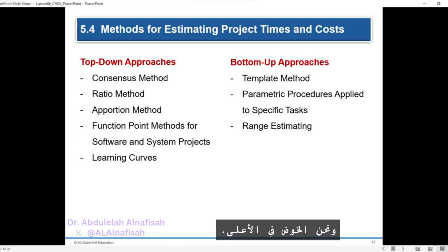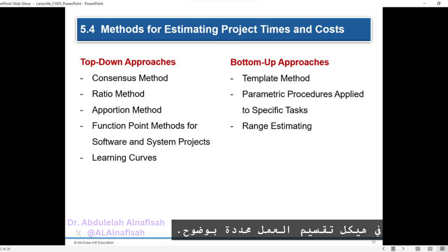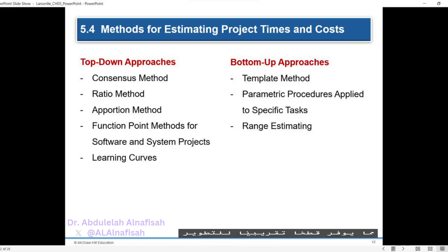In this discussion, we delve into top-down estimating methods at the strategic level of project management. In situations where detailed information is lacking, like in the initial project phase or when the design is not finalized, top-down estimates come into play until tasks in the work breakdown structure, WBS, are clearly defined. The consensus method involves pooling the experience of senior and or middle managers, often utilizing the Delphi method for greater rigor. However, these top-down estimates are preliminary and occur in the conceptual stage, offering a rough cut for initial project development.